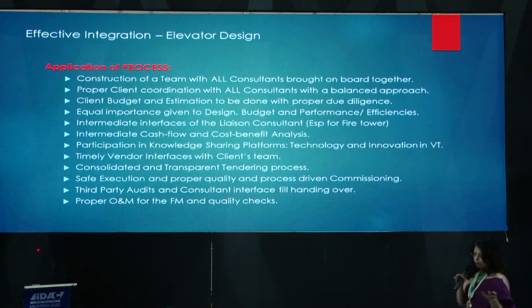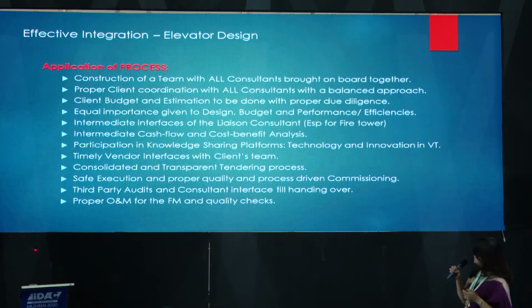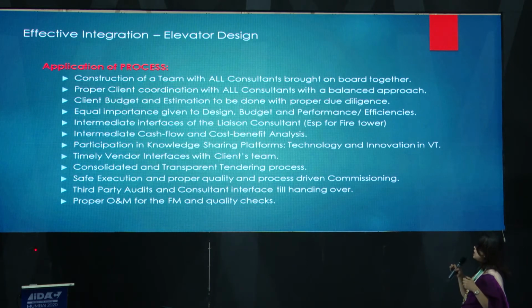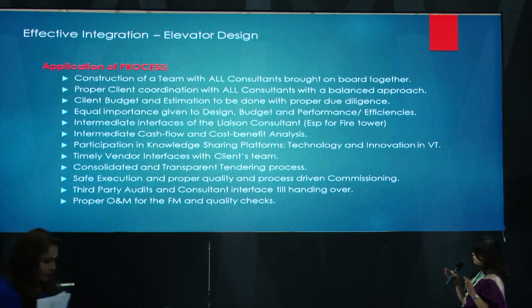Then, of course, platforms like this, which we are participating in, technology and innovation platforms, are very critical for us. And then timely vendor interfaces with the client's team. It should not be just left to the tender stage, and then only you talk to the VT guy, the manufacturers. You should have interactions way earlier. And you should have a consolidated and a transparent tendering process. To my mind, it is very critical.